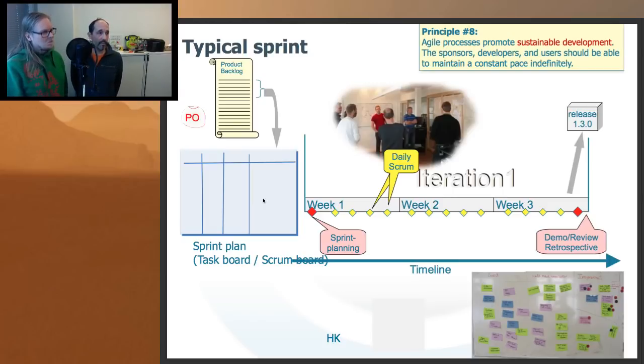And then with this board, during the whole sprint, we track how they get done. This is the visual board where we see all the work that needs to be done, who is working on what, the phase of it, and so on. If it's a happy sprint, then in the end, all the work has passed from the left to the right, and everything is done. If not, then there are ways to deal with it.